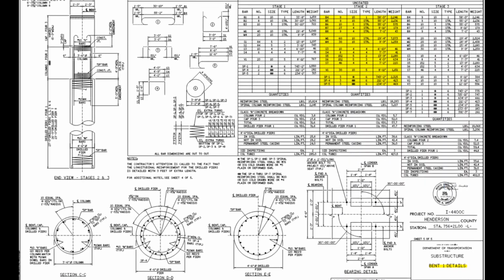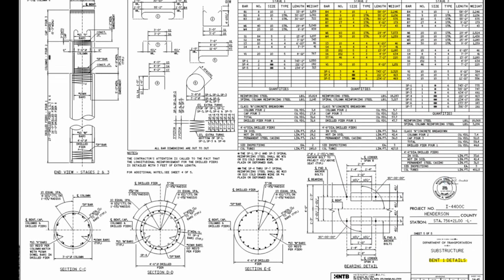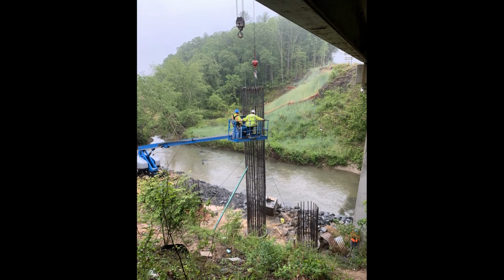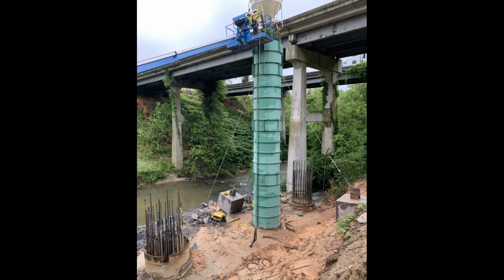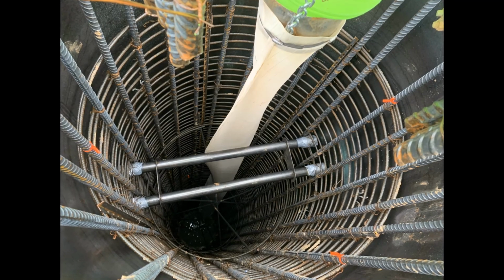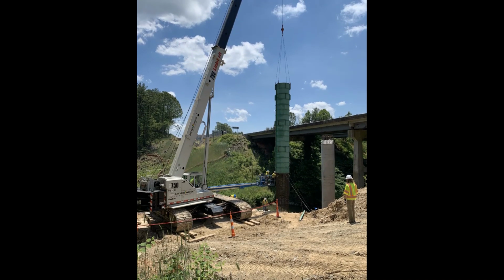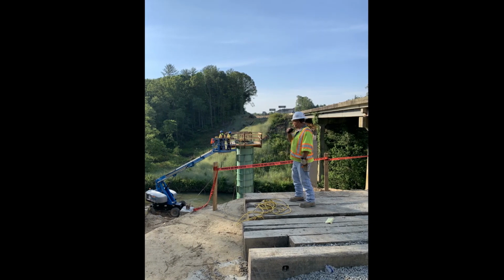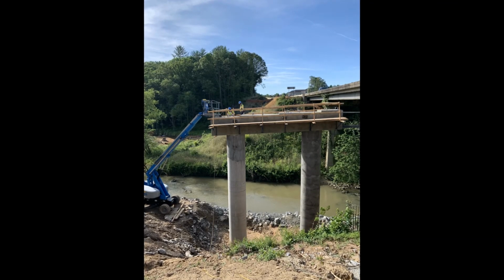They may also determine manpower necessary, equipment needed, and any additional material that would accompany the operation. That can include items like rebar ties, slings for rigging, forms, bracing for forms, and concrete to actually pour the column. Ultimately, you are constantly creating a takeoff for all operations, some of which will be more formal and detailed, and some of which will be made on the fly.